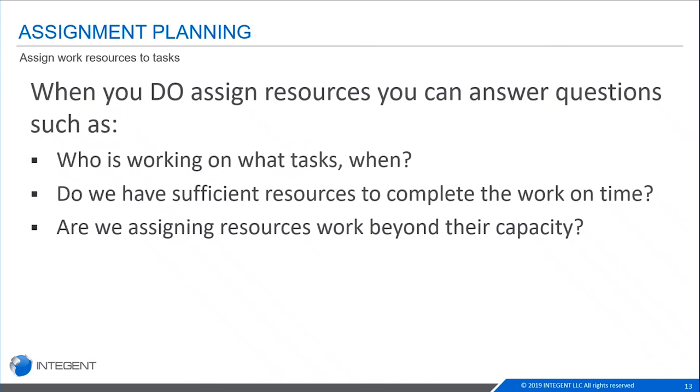If I have a schedule and it's a set schedule and I add my resources and it shows me that there is too much work for the team that I have, then Project will show you that. It'll give you some over allocations. It'll show you that those people are over allocated and have too much work on their plate so that your organization, you as a project manager or your manager or whoever makes those decisions can determine if you need to hire more people or if the project needs to be lengthened or what kind of business decision goes behind the information that Project will provide you.